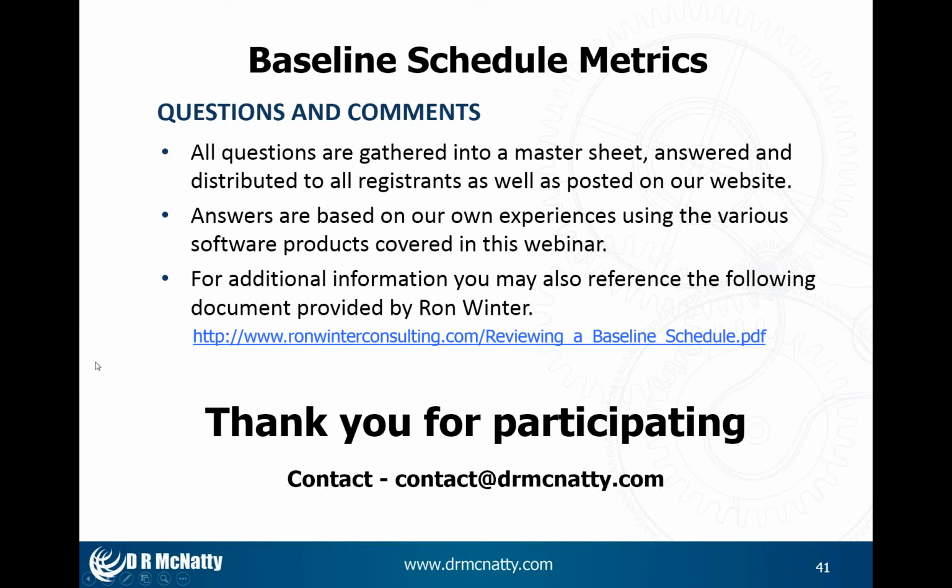Next question. For activity descriptions, do you recommend an action word to start the description, or maybe a location or area to start the description? I'd say whatever you're comfortable with. I'll usually go with an action word like erect forms, and then I'll code the activities. And there's ways in Excel where I can concatenate, let's say, location descriptions onto the activity descriptions to make it easier to build my descriptions when I'm building the schedule. So I usually start out with what's happening, followed by where it's supposed to happen.